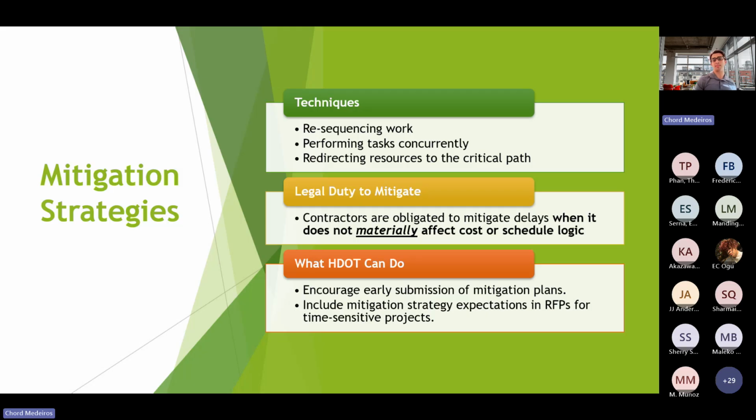Yes. So building off of that, materially affect means a change or impact that is significant enough to alter the outcome of a project. So not just a minor inconvenience. In a schedule, materially affects the critical path. That would mean that it would extend the critical path. If it materially affects the critical path, it will extend project completion, not just a small shift in, let's say, a non-critical path activity. So that would be material, that would be materially affected. So that is the difference.